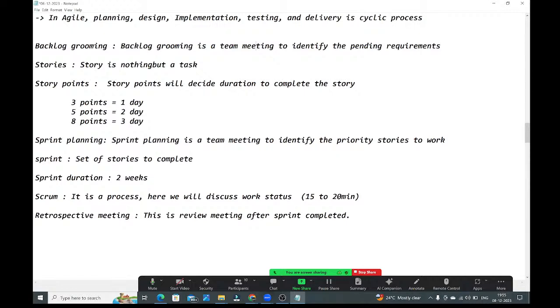Suppose here one day you spent to analyze the issue. If you want to work on that, you need to do a lot of analysis. For that analysis you need to spend time, because without analyzing we can't work directly. So that analysis also, you can add 8 hours you spent to analyze that issue. After that you have started, so for working it took 8 hours. For testing it took some more time. So you can add all these things and give it in the actuals.